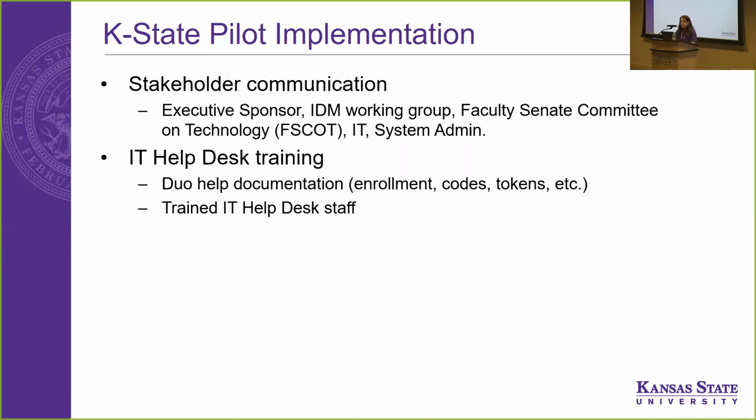And then we also kept a change log based on all these surveys we were sending the pilot group. So we kept a change log of the changes we would make now and the changes we would make after go live.